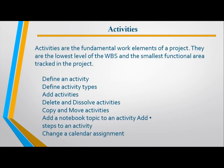In Primavera P6, an activity is a fundamental work element of a project. It is the lowest level of the WBS (Work Breakdown Structure) — the smallest functional area. Activities contain information including resources, duration, and relationships. The project is built around these fundamental activity elements.